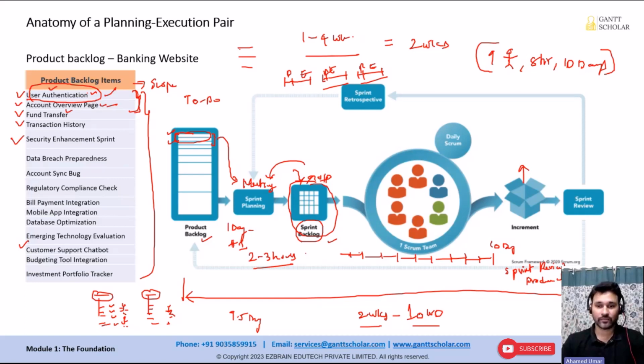All right. So likewise, let's say out of these two features, we completed one and it got accepted. The first feature got accepted. This one did not get accepted. We got some review feedback. So we're going to move this to the next sprint, and along with this, we will take a few more items, because just to fix this, the received feedback, you don't need 10 days of time, right? So we take this as part of our next iteration goal. But in addition to this, we will also pick one or two more features and do the same. The whole process will be repeated.